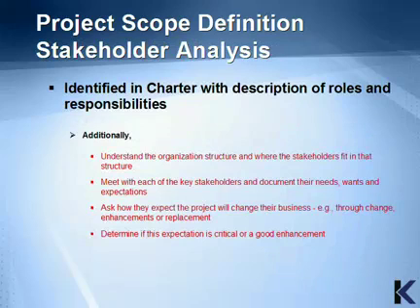In this case, stakeholder analysis is where you're identifying the stakeholders' expectations, needs, and desires. From this, you derive the detail of the project goals and deliverables. It's assumed that you've brought the stakeholders in during the project charter or preliminary scope statement creation, but this analysis is a revisit to the information you've accumulated about the stakeholders and what they want. You want to bring that information into additional detail in this next deliverable. Remember the term progressive elaboration? This is a good example of it.